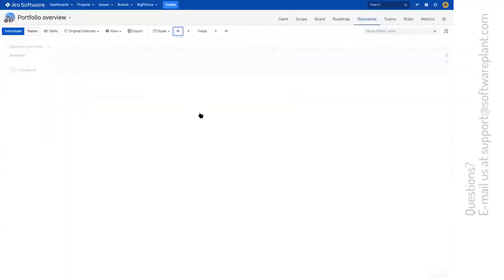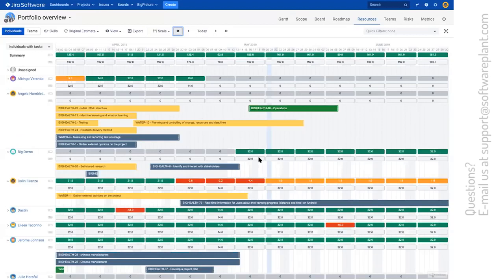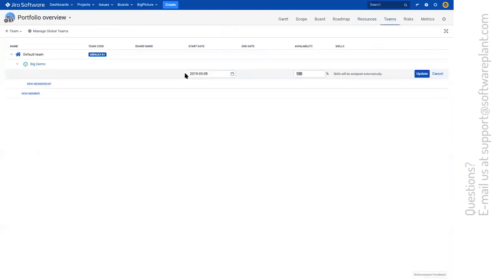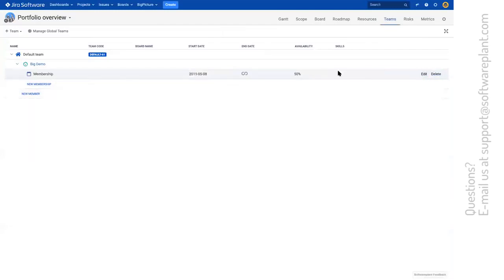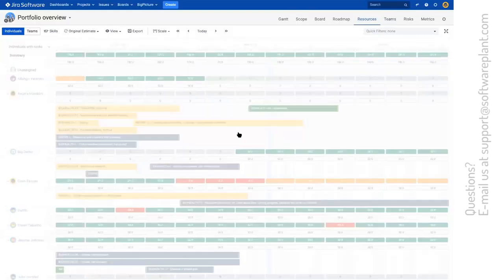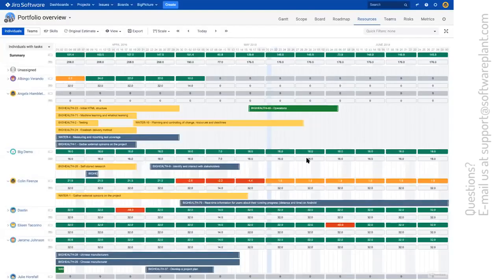Let's check his weekly availability. It's 32 hours for big demo user. Now if I were to change his allocation to 50%, and this allocation is done from 2011. Then from 32, we have changed the allocation to 50%, which is 16.